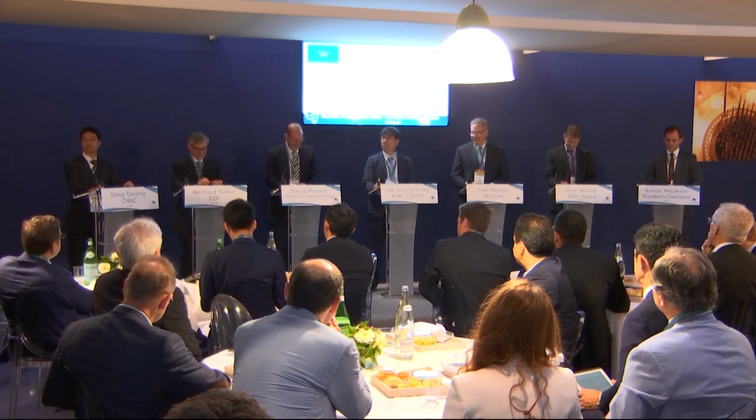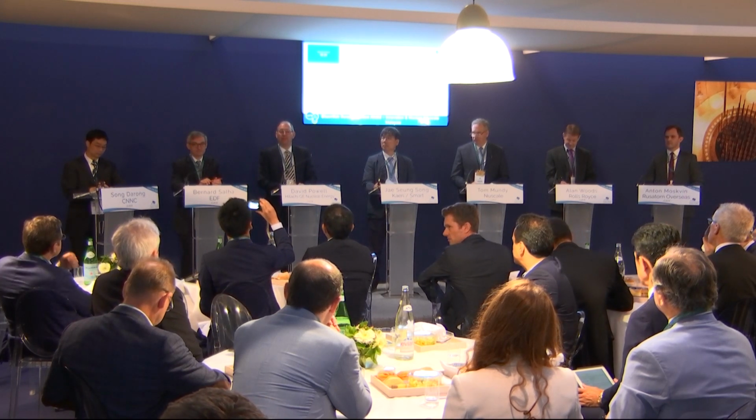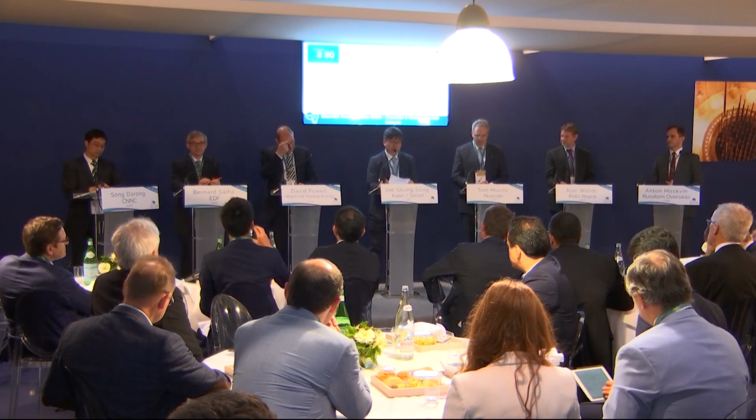Okay. Well, the need for harmonization between the various standards, the impact on cost, and so on. Mr. Song, would you like to start, please? The impact of regulation on the cost would be very, very high and uncertain. But no commercial SMR has been constructed to estimate it quantitatively. To reduce this kind of uncertainty, it is very effective to use a pre-application license process, such as the design certification of US NRC or the standard design approval of Korean NSSC.